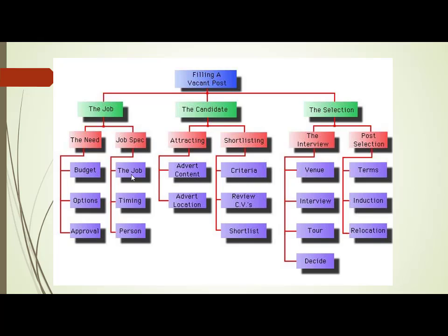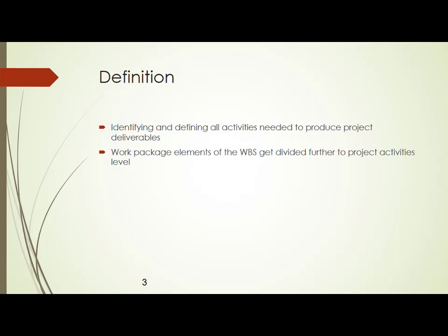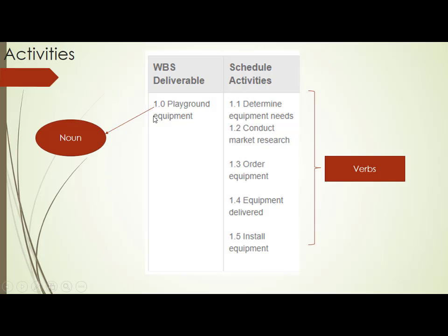So when you are talking about define activities, you have to mention the activities involved in that particular work package, called the job. So when you are doing a WBS, ensure that all the work packages will have nouns as the names and the activities will have the verbs. So I will take one example, you will understand this better.